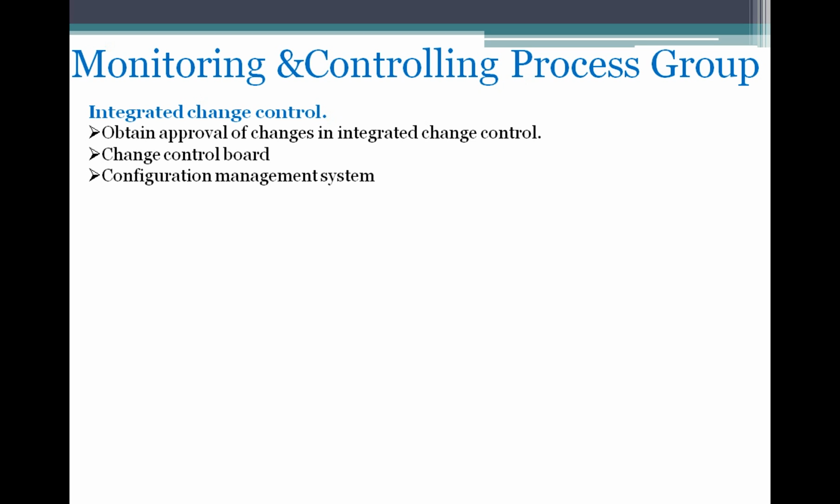Through configuration management they maintain this version control of these project documents, so that the project team or key stakeholders, anyone who refers to those folders, will have the latest version of the project plan document. So every key stakeholder, project team, everyone refers to that document.